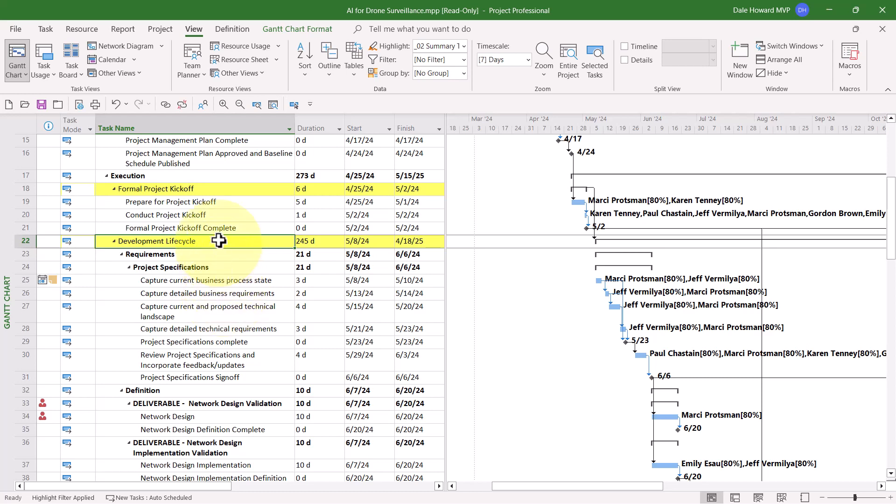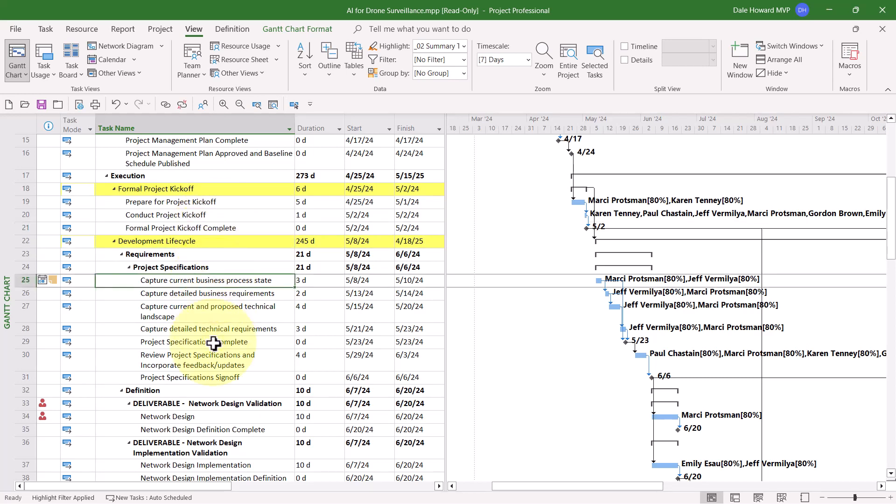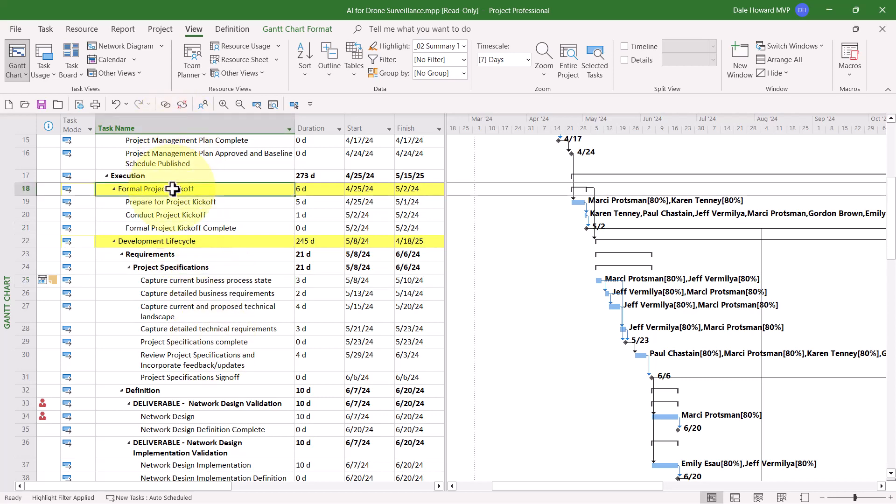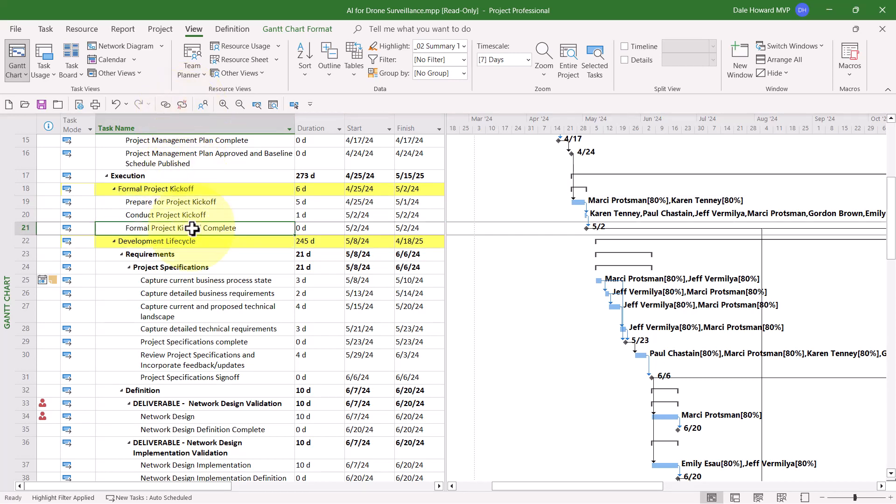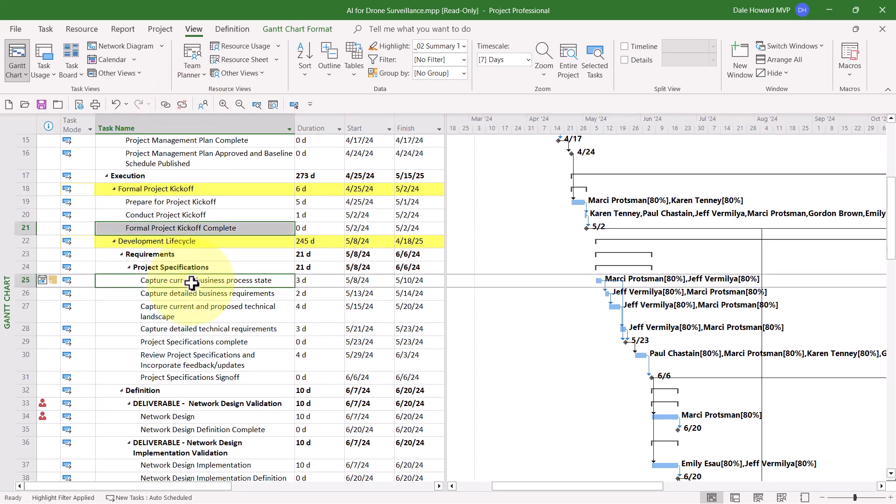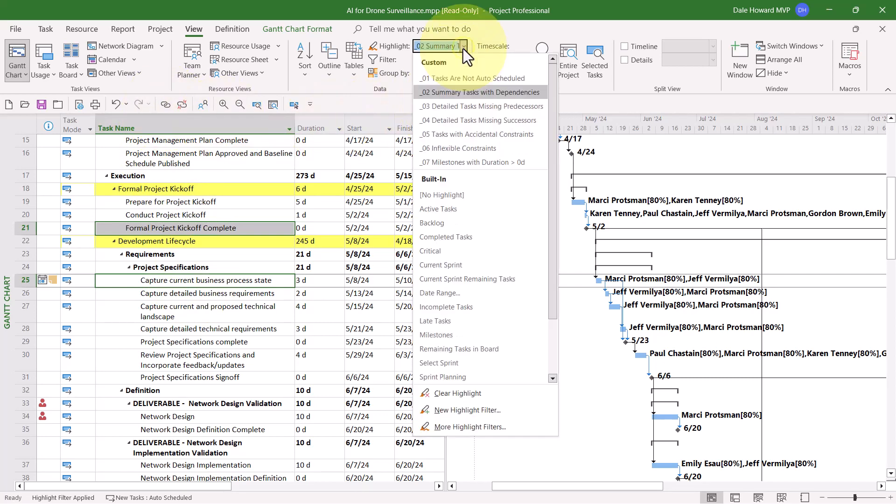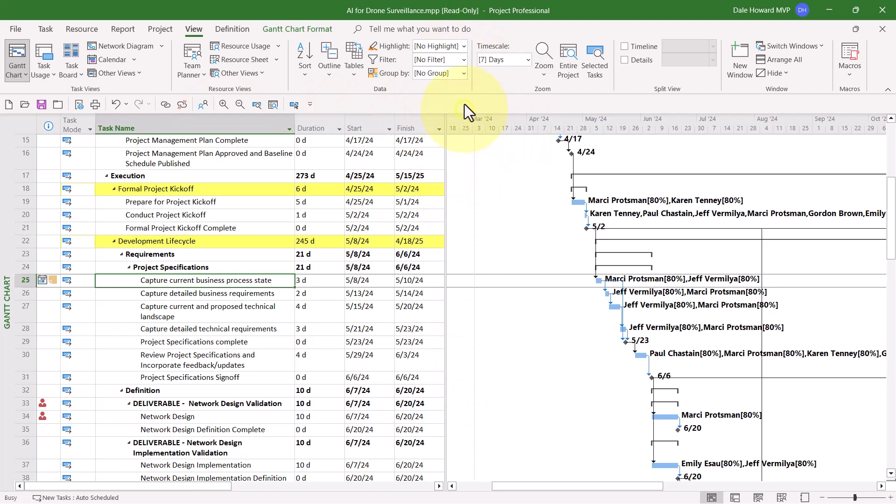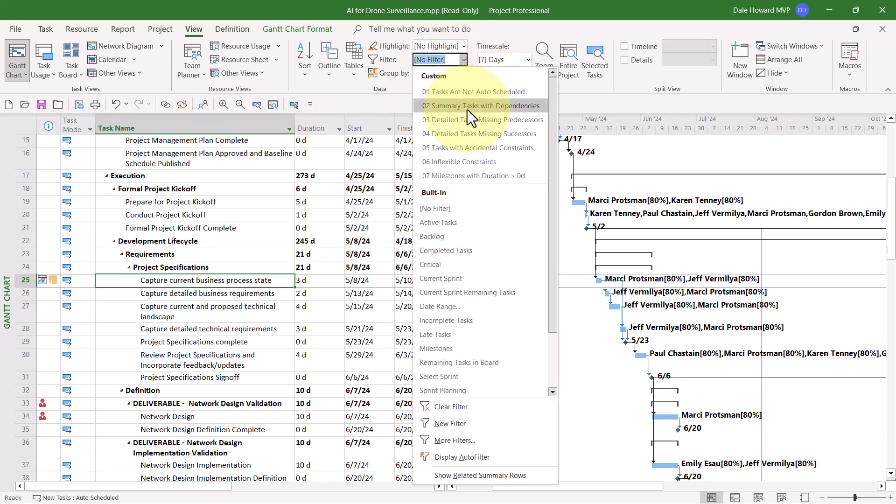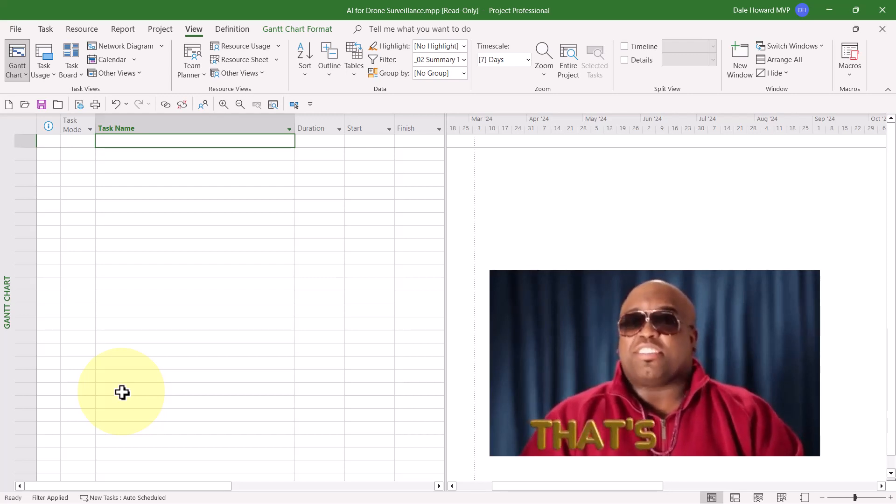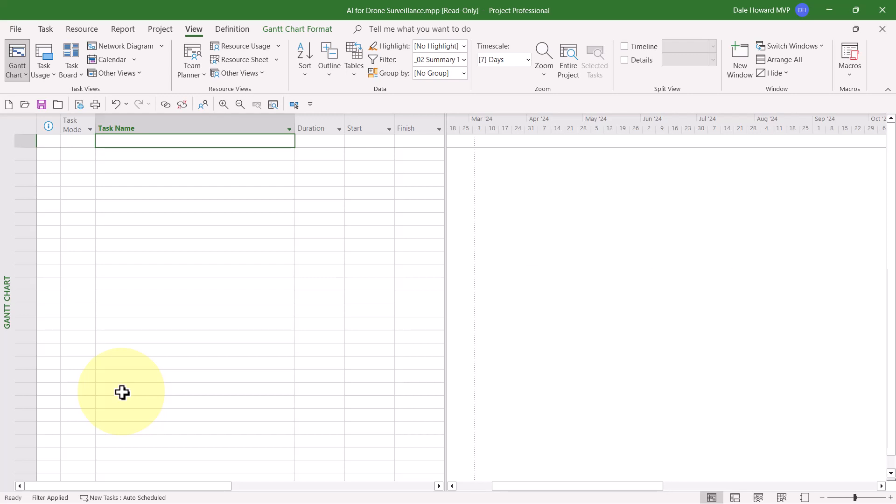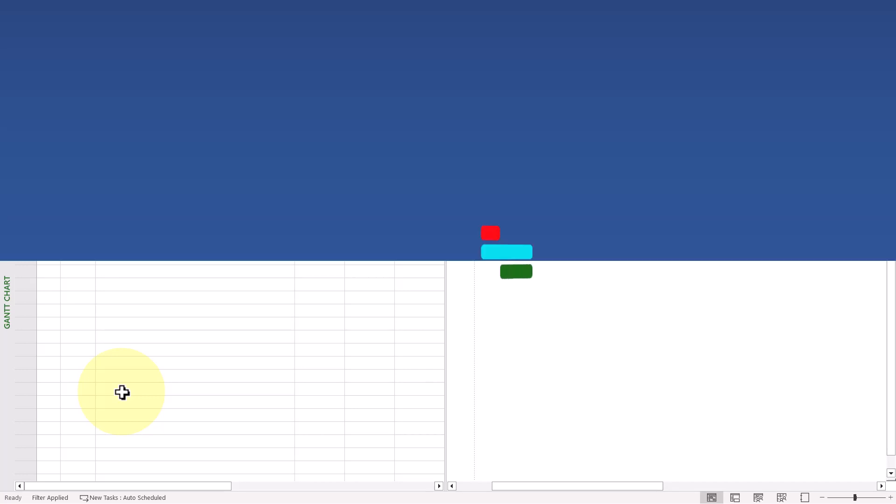Well, in our case, it looks like what we would need is task number 21 should be linked to task number 25. So I'll go ahead and highlight the two summary tasks that are currently linked. I'll break the link. Then I'll select number 21, hold down the Control key, select number 25, and link them. Now let's go ahead and remove the Highlight Filter, and I'll reapply the original filter, Summary Tasks with Dependencies. And look at there. Woo-hoo! Problem solved. A blank task list is returned, which means there's no problems of this type left in the project.